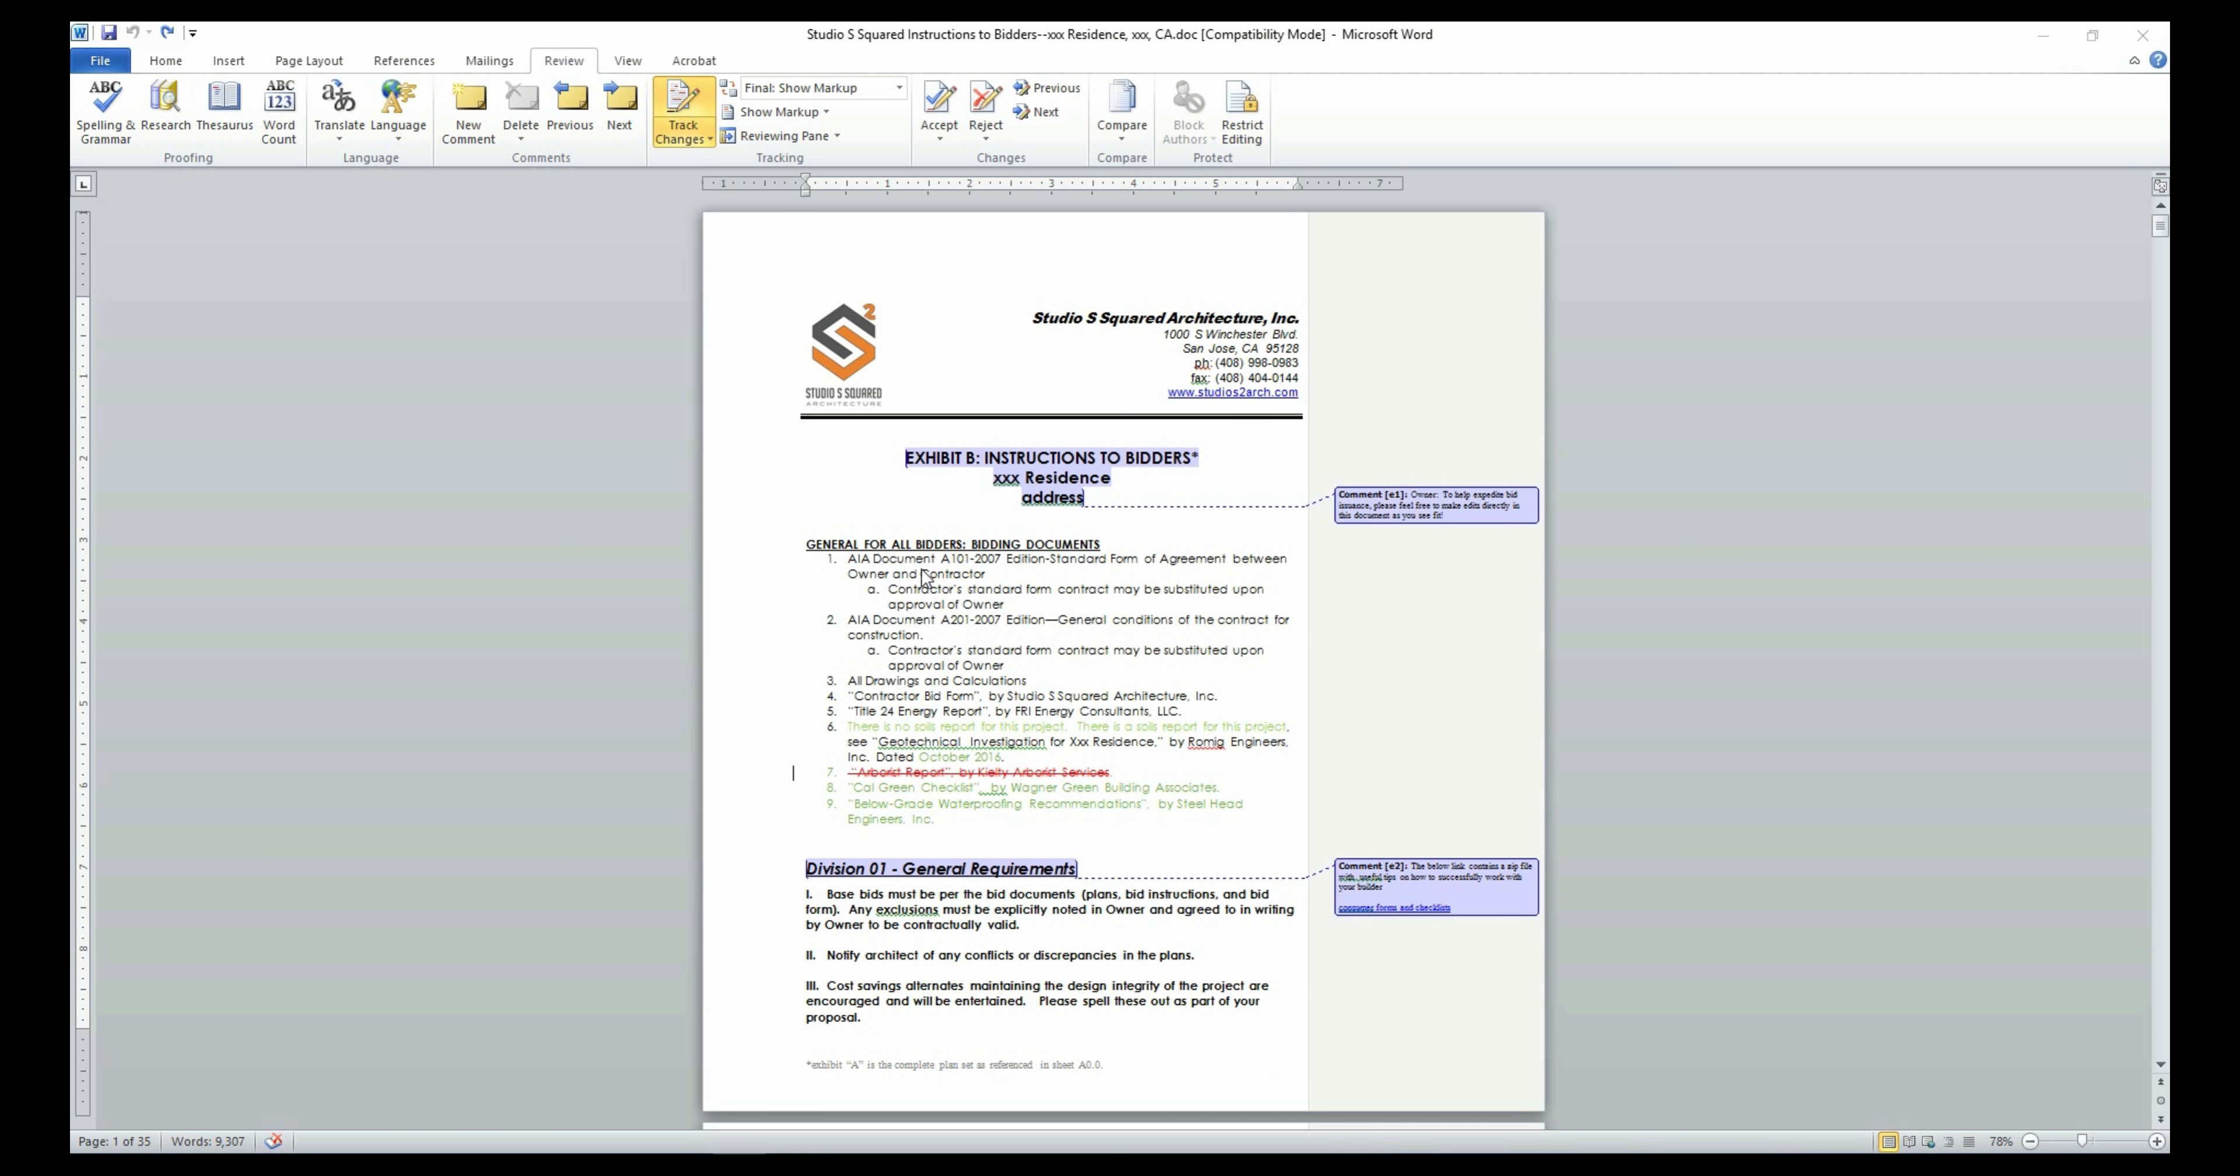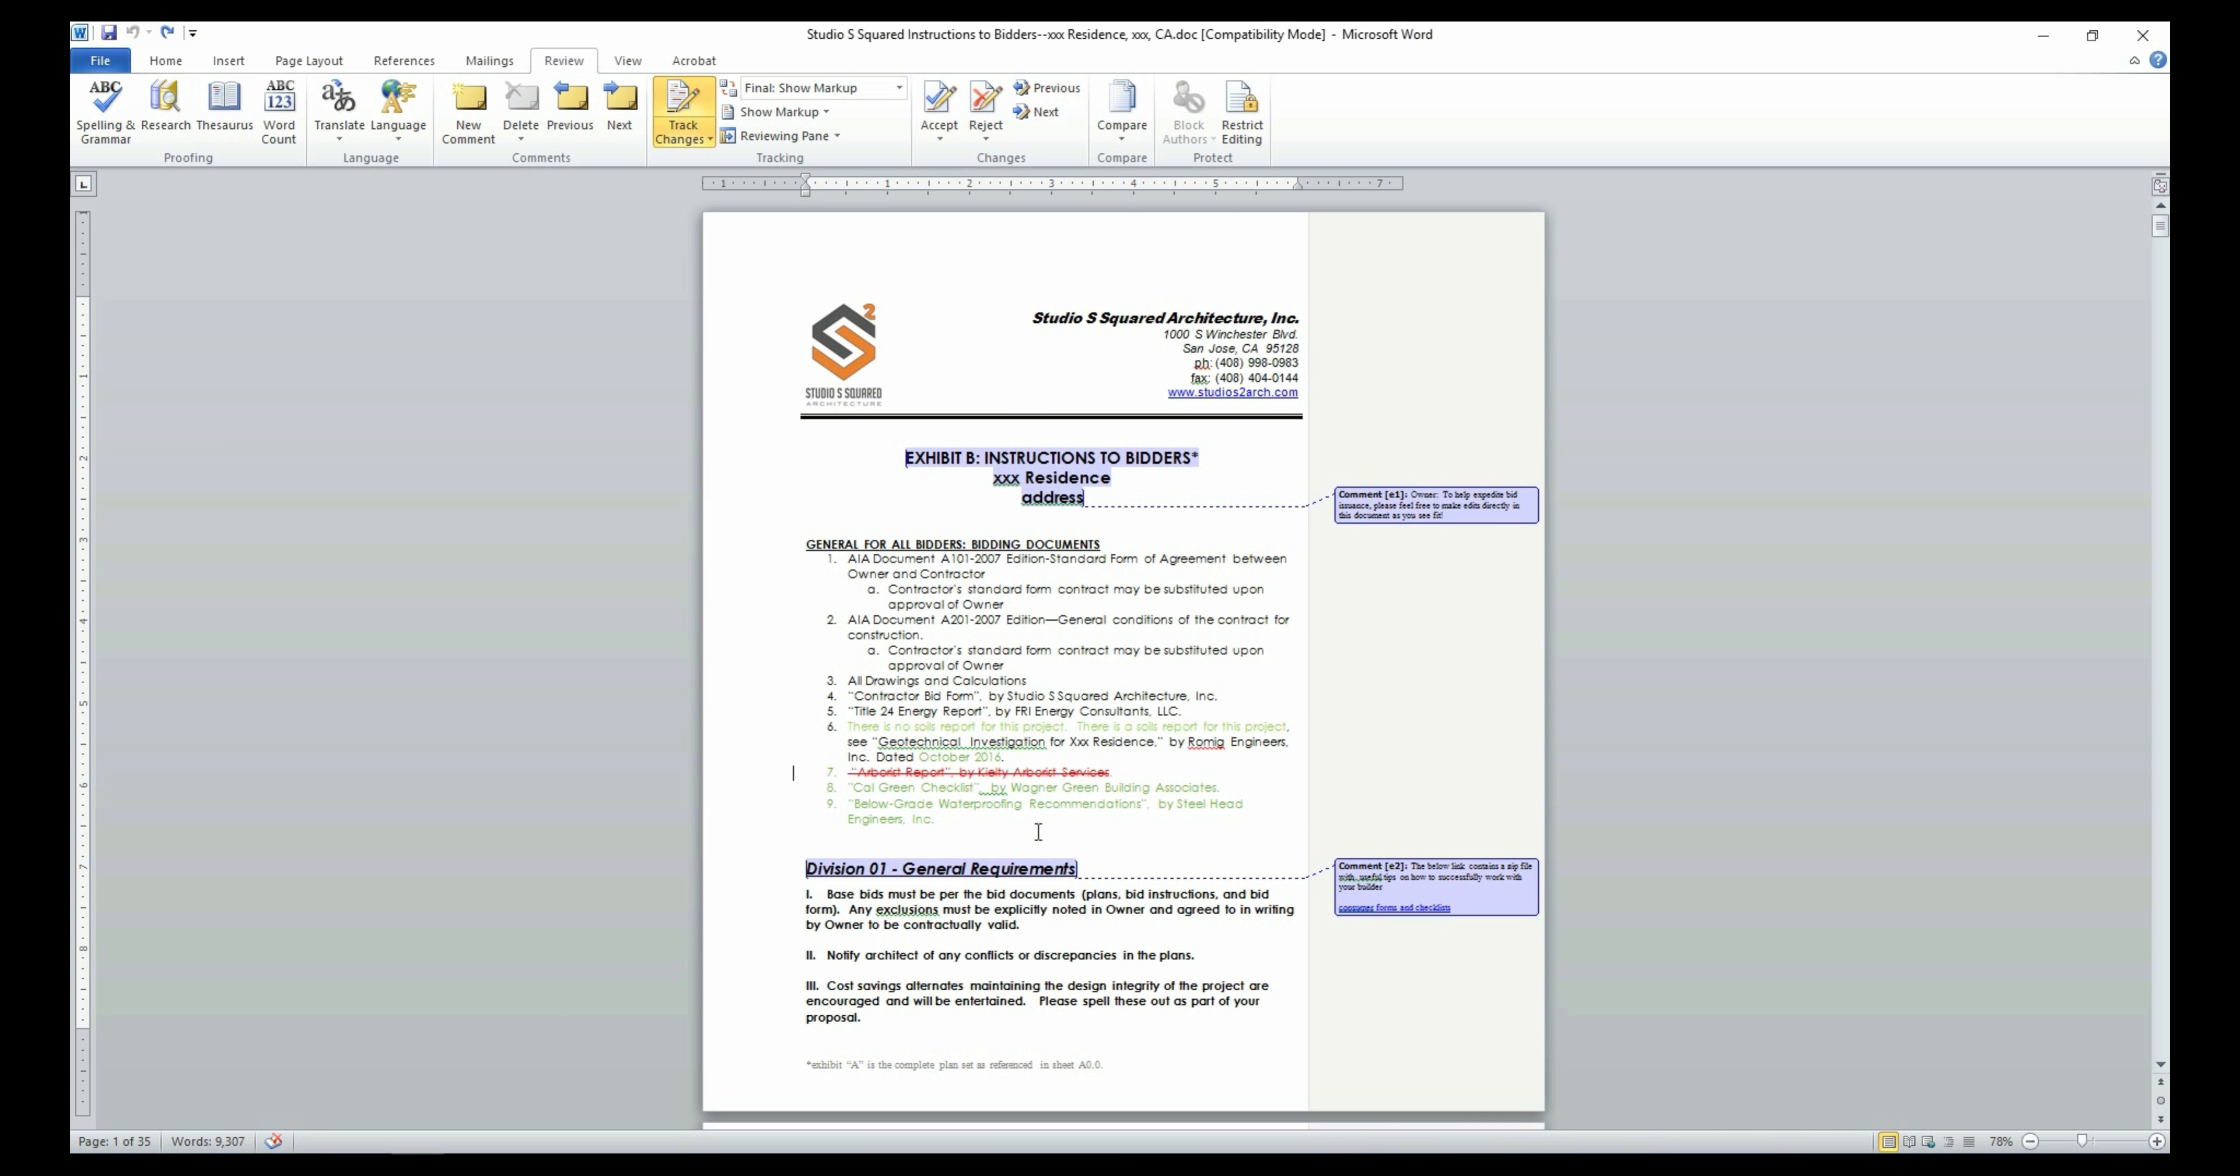Now let's take a look at the individual sections of the ITB. The first section lists all the attachments that will be included as part of the bid set that will be sent to the contractor bid pool for the purposes of bidding. The list will include the plan sets, reports and calculations from the various consultants, and also the soils report and landscape plans if they are part of the project scope.